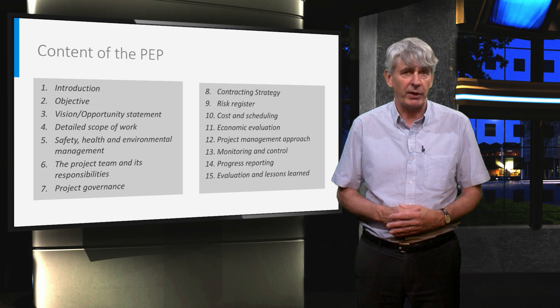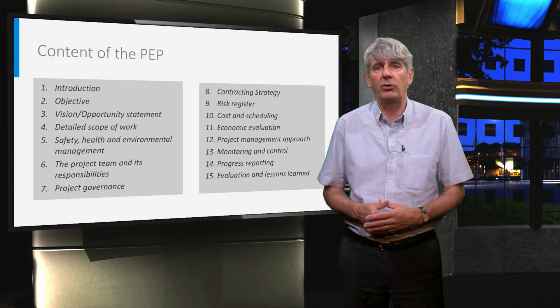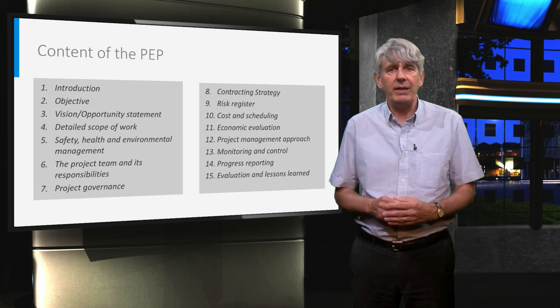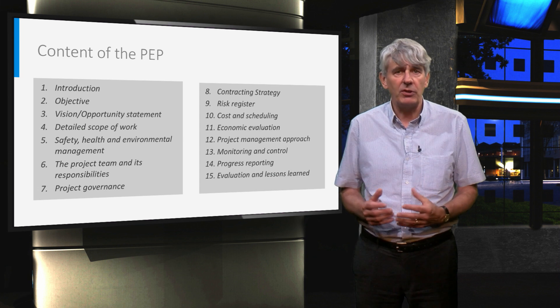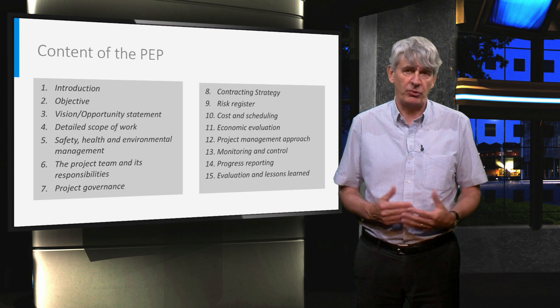The project organization and governance are addressed as well as the selected contracting strategy. A risk register is part of the project execution plan, followed by the cost and schedule estimates. A link to the business case is made in the economical evaluation section.